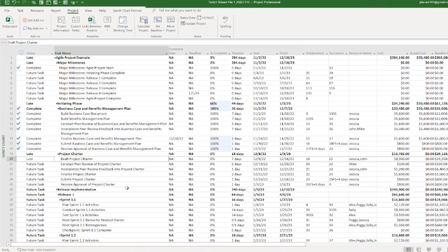And there you go. So, now let's say my drafting of the project charter is not going well. Maybe some things occurred. Who knows? So again, first, before I add my percent complete, I'm going to increase my duration because I want to change my finish date. So let's say this is going to happen 10 days. As you see, my cost changed, and look, I'm eating up the time I just made up because I took too long. And let's say, just for funsies, that I only got 20% done.